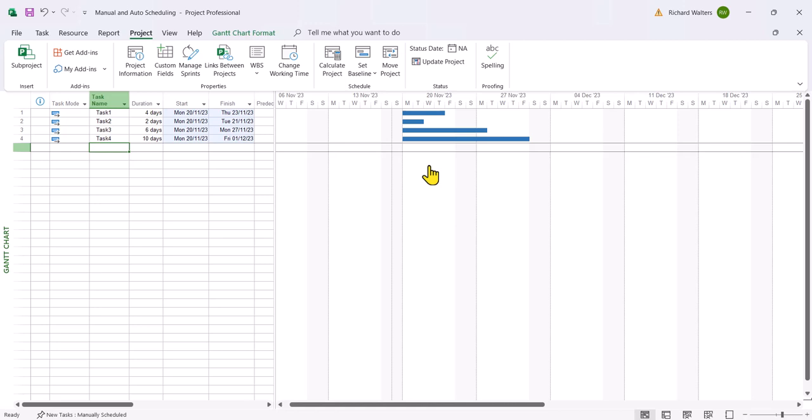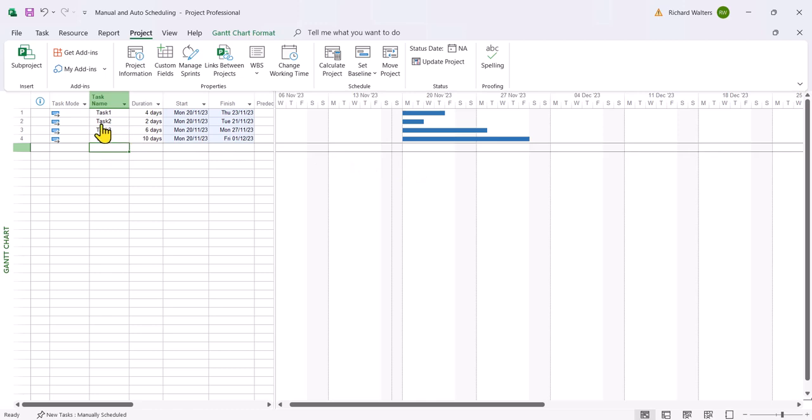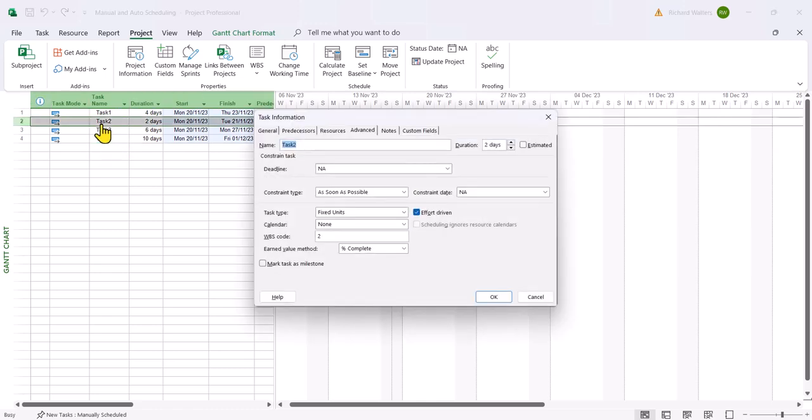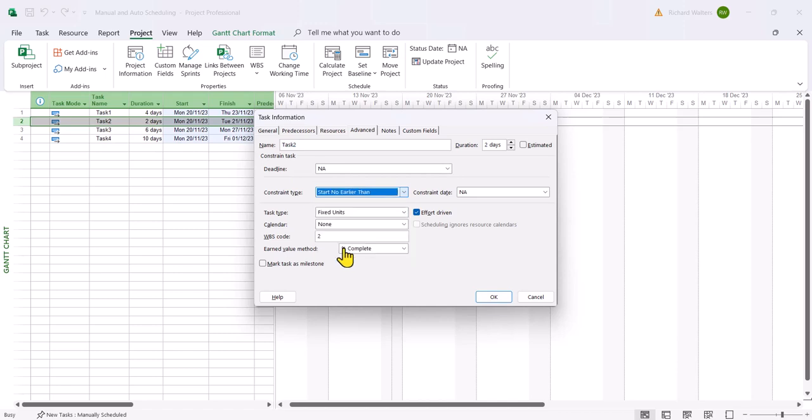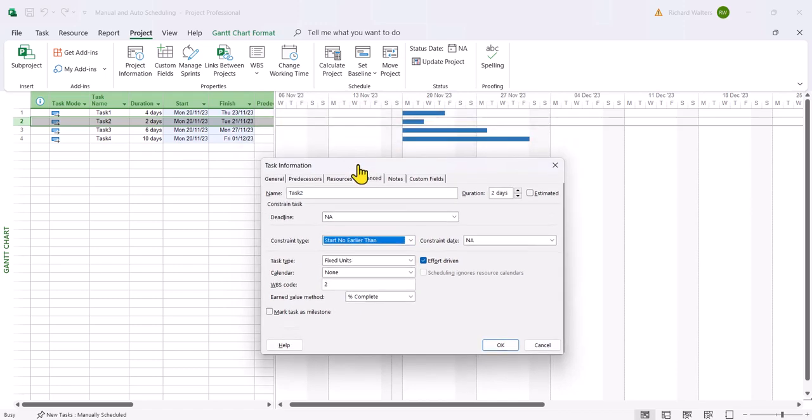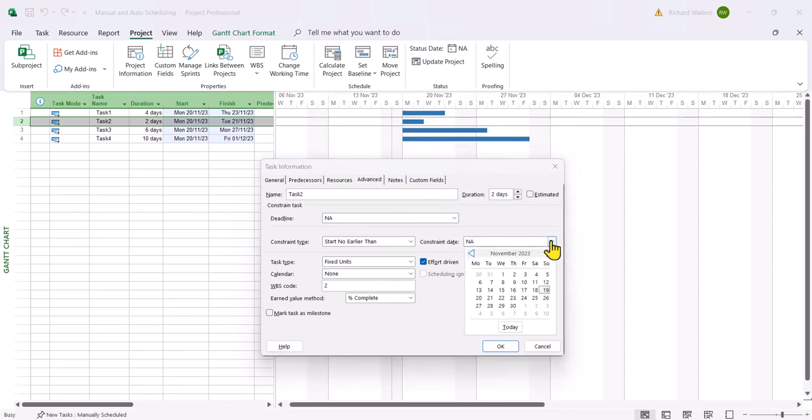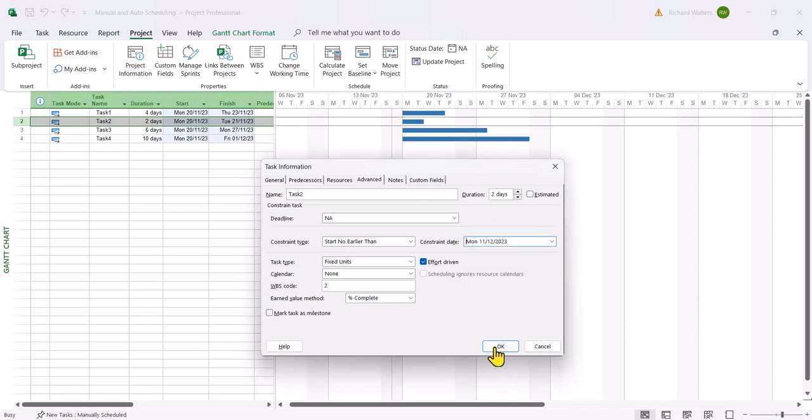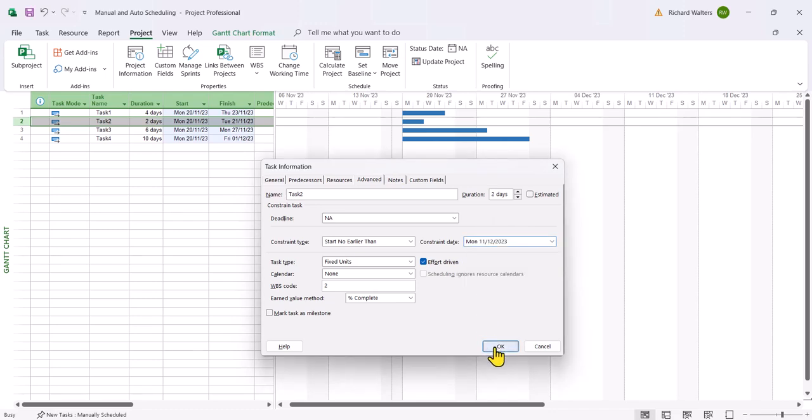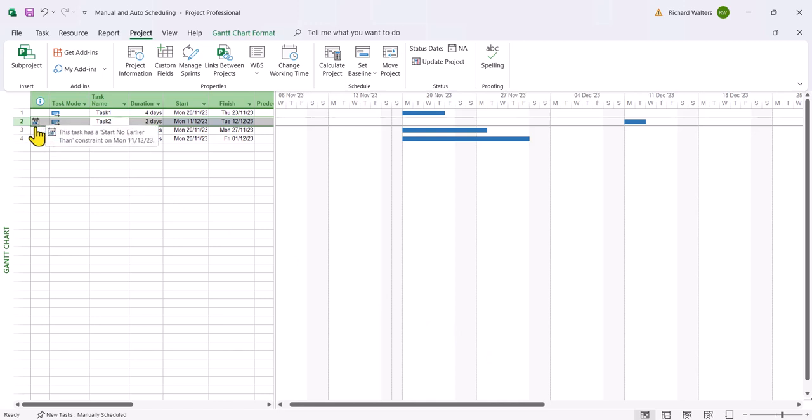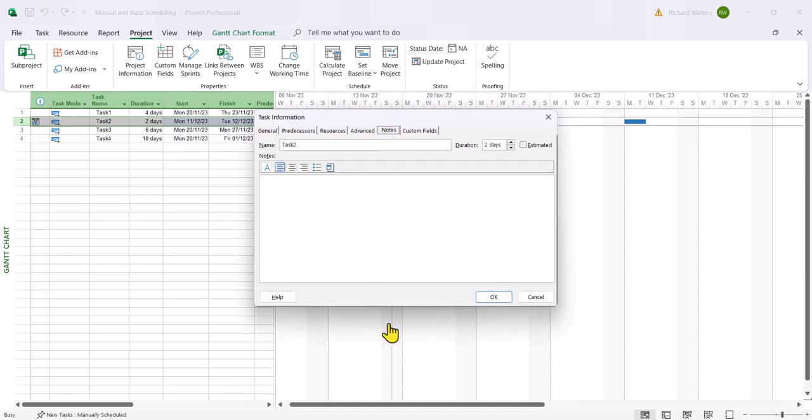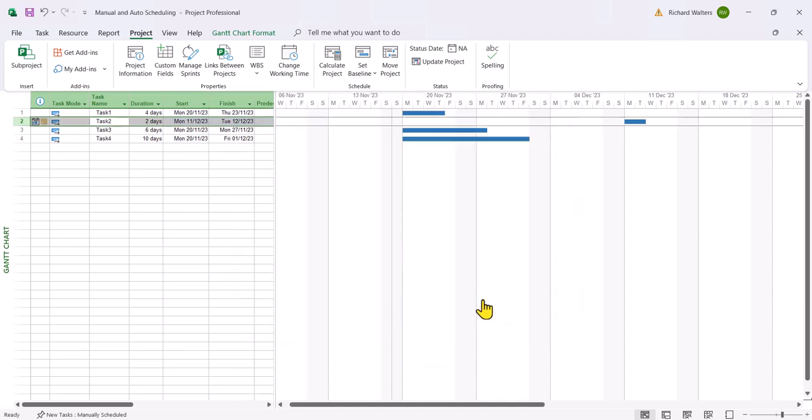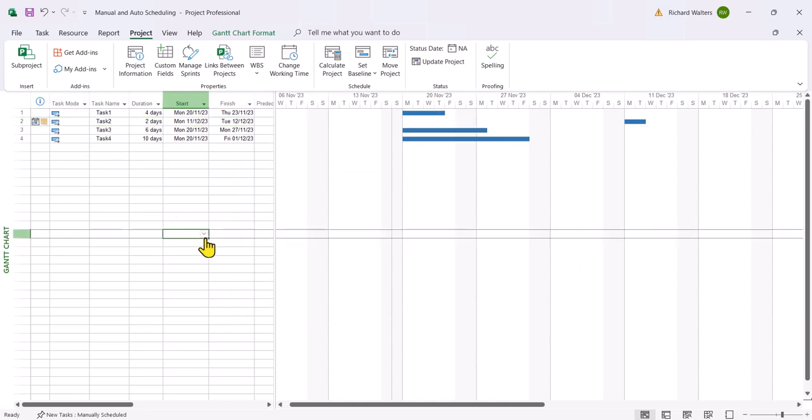So now we have to delay task 2 for example which is the ID 2. I'll just double click it. So there's a problem with this task, I set a constraint and I'll say start no earlier than, or look at the date. I'll say okay there's a problem with this, can't start any earlier than some date in December so I'll just pick a date of December, click okay, and straight away the automated task moves on to show me there's a delay and the constraint then shows me there's a constraint being applied and I could add a note to this if I wanted to. I could say delay of material in a supply chain situation so I'll just put a quick note and there's the note that goes with it.